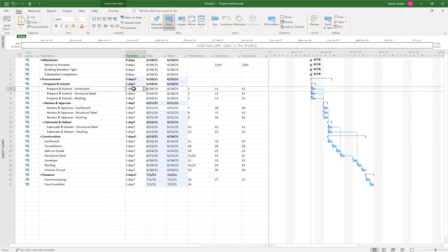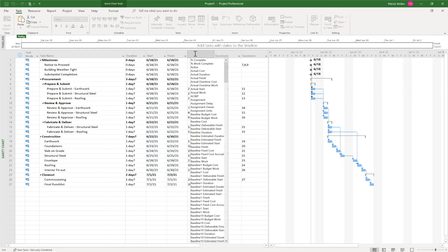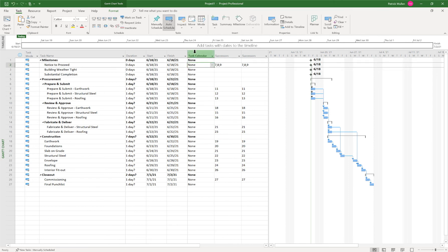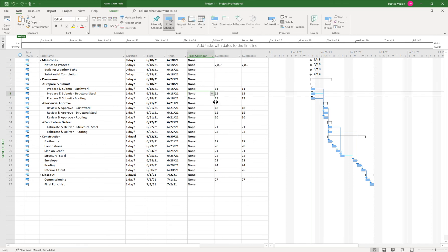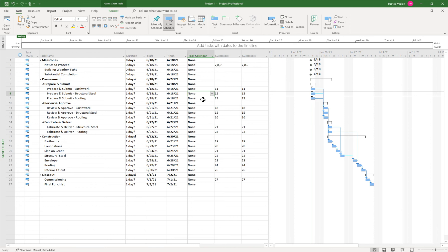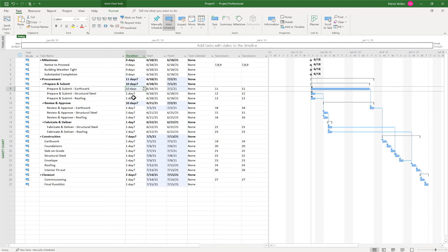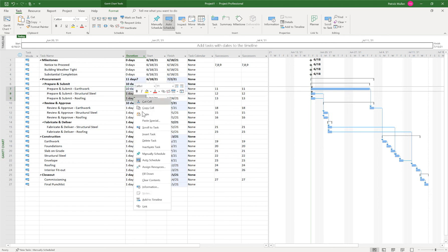So then we can go through and start defining our durations for our tasks. So maybe this is all, I believe this is all in work days. Let's check our calendar type here. So there's no calendar currently assigned, but I can see here that the weekends, there's no work that's being performed on the weekend. So I'm assuming that this is a five day work week, according to the automatic calendar that we have in here. So let's say the prepare and submit, let's get two weeks for those submittals. And again, I'm just going to do my fill down here.